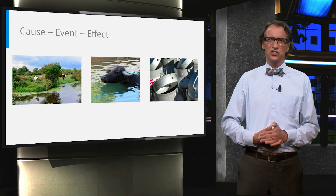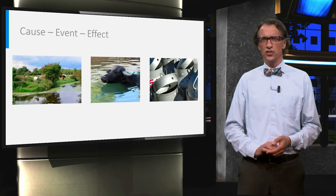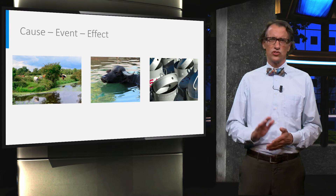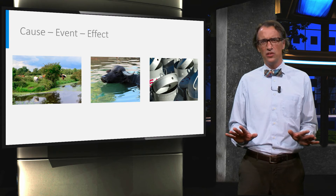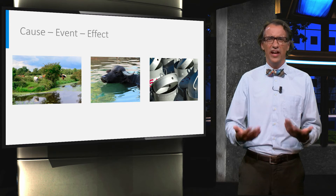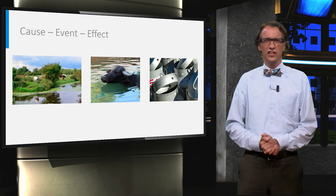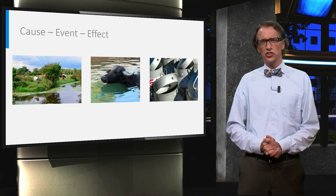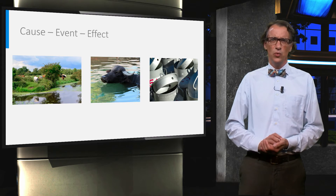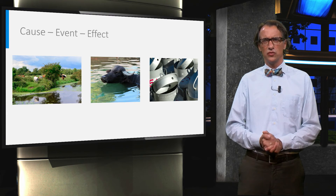Let's illustrate the structured risk description — it helps you in selecting an appropriate mitigation strategy. Let's start with the cause: cows are standing in the meadow, but there is no fence between the meadow and the water. As a result, a cow might fall into the water. Obviously, this will influence her milk production and hence the farmer's income. In the worst case scenario, the cow might even drown.